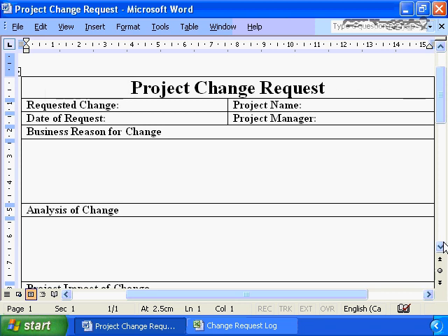If you're producing a final product, go back to our bread box example. If you're producing a bread box, and once the bread box has been through a prototype phase, and the business decides that 2 hinges on the bottom of the bread box isn't enough, that they need 3 hinges, that is an approved project change. Any change to any approved, and that's the key, any change to any approved component must be documented through the change management process.